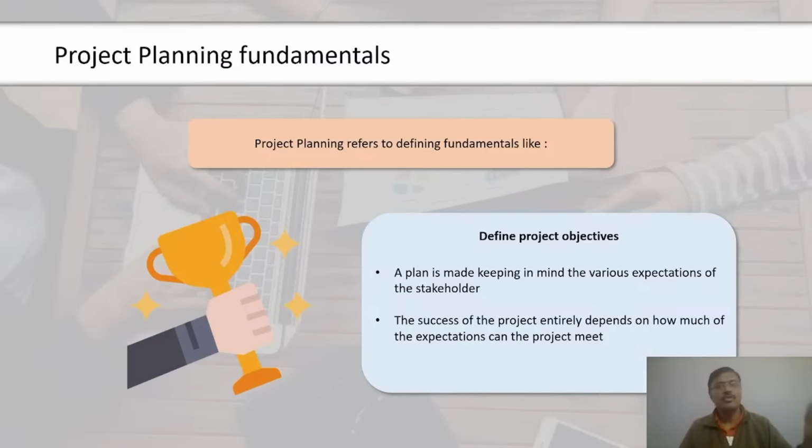While estimating the project time, the WBS is created to break down the project into smaller deliverables. These deliverables are broken down into work packages, and these work packages are in turn broken into activities. Control account is defined at a level higher than work packages. For example, if 5 work packages are part of one control account, the cost of all activities belonging to these 5 work packages is managed as one unit.